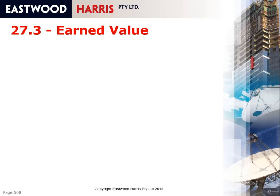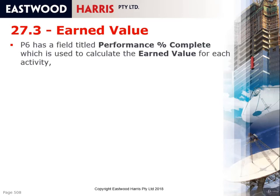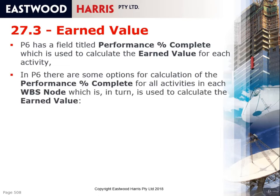How does P6 calculate Earned Value? P6 has a field titled Performance Percent Complete which is used to calculate the Earned Value for each activity. In P6 there are some options for calculating Performance Percent Complete for all activities in each WBS, which in turn is used to calculate the Earned Value.